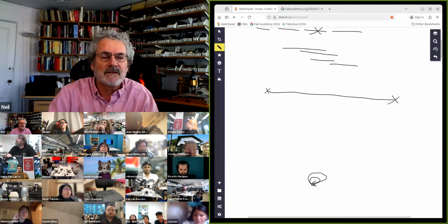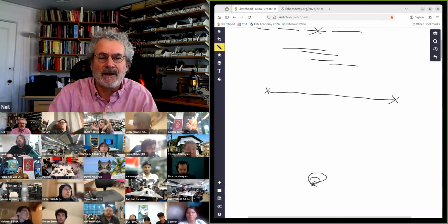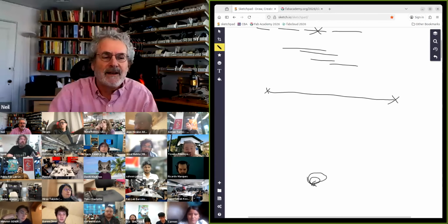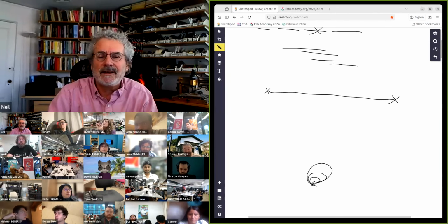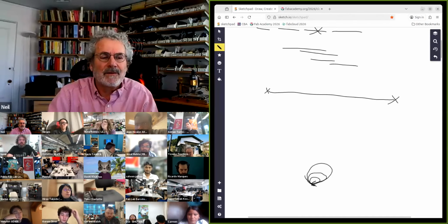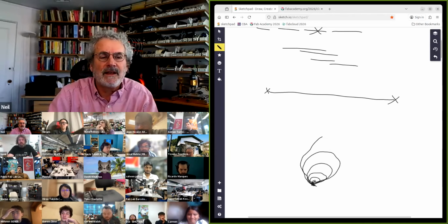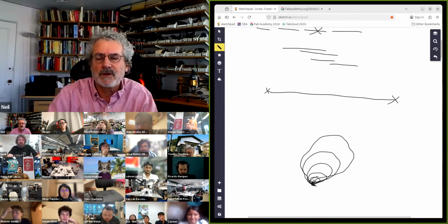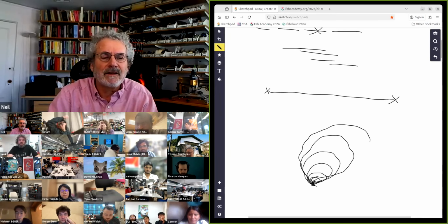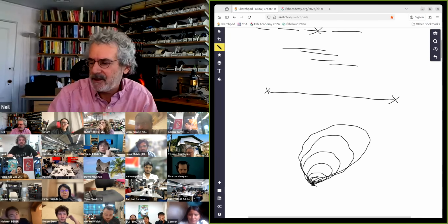The next version is you make a full size one in cardboard, but there's a finished robot. The next one is you make it in a finished material. Then you add motors, so it's moving, but the motors are pre-programmed. Then you add a programming interface, so the motors can be programmed. Then the battery, it had a tether, so the next one is you add a battery.